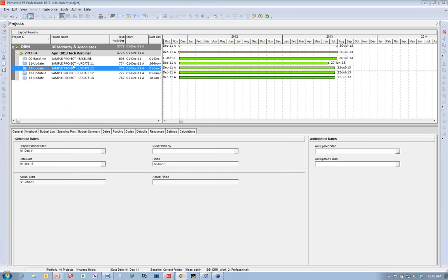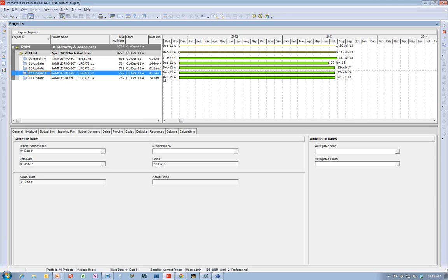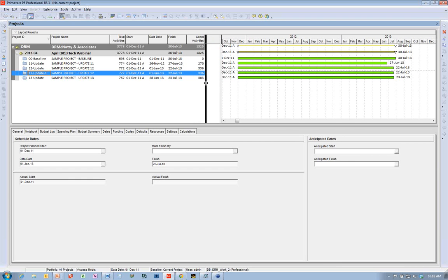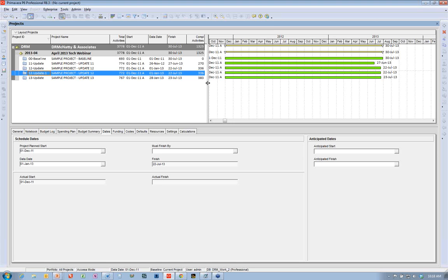Okay. So I've got all of my projects right here. You'll notice that I've got the one that I'm working on, I have a copy of the project. The other reason I like P6 Pro is because I can pull an XER file in without having to recalculate it. To me, when I'm reviewing a schedule, recalculating is the same as destroying the evidence. So if I import a schedule from P3 or Microsoft Project, I know that there's changes made in the schedule, and I have an issue with that. And pulling in an XER file, I can prevent it from being recalculated.